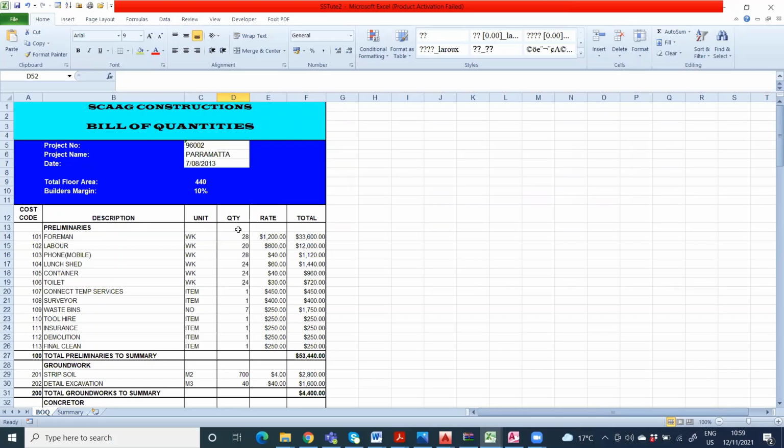Likewise, in preparing a BOQ, if I refresh our knowledge, we need to adhere to, or follow, certain guidelines. We call them methods of measurement. How to take measurements? What is the unit? What is the way of taking quantities? So there are codes and practices for professionals to follow, so that everybody in the construction field can understand.